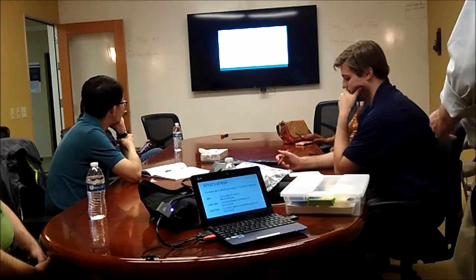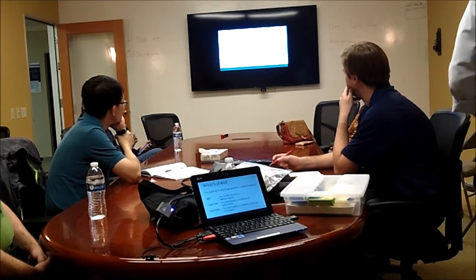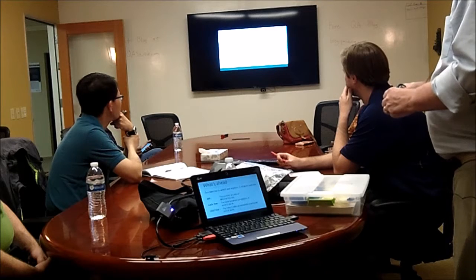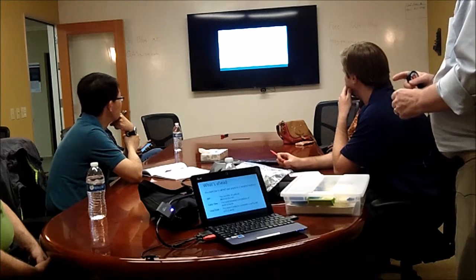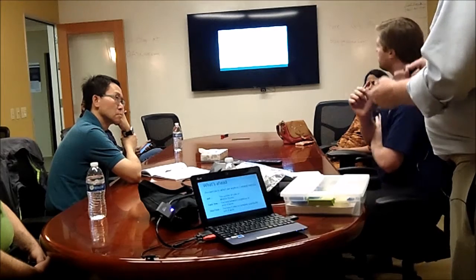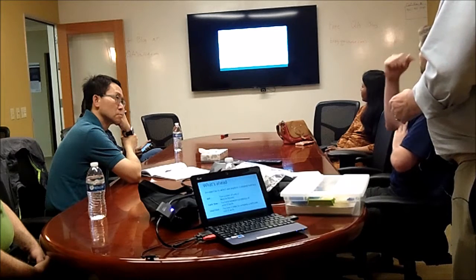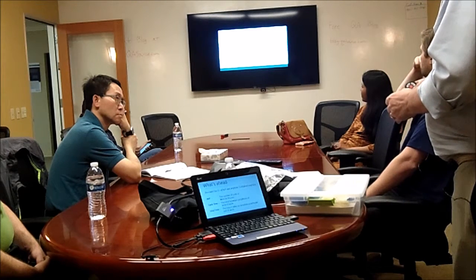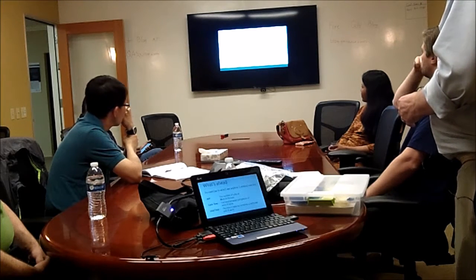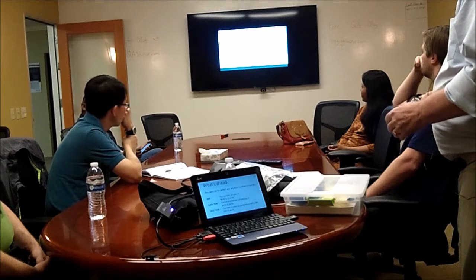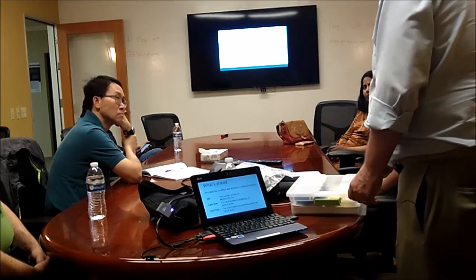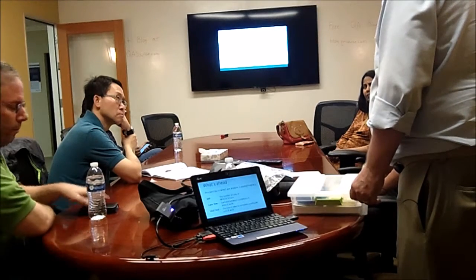And then the lead time is also defined in a confusing fashion in some places. It's the time it takes to complete a particular unit of work, not just any unit of work, but one particular one. So if you feed this into the system, how long does it take to get out the end? Cycle time and lead time can go in steps sometimes. They're not the same units, but they seem to track each other. And sometimes the lead time can just grow and grow and grow. And this is not good. Lead time growing is a real sign that something's not ever going to get done.